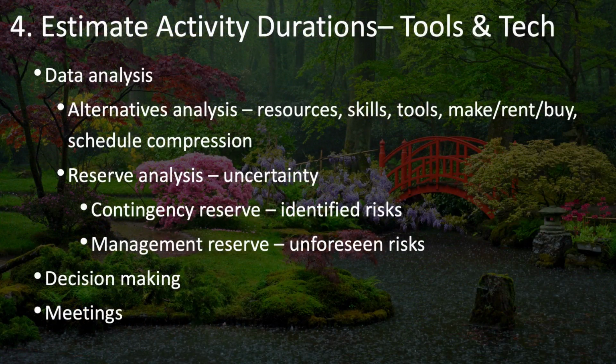There are also 2 data analysis tools that are part of the estimate activity durations process. These are alternatives analysis and reserve analysis. Alternatives analysis comes into play because as you're estimating activity durations, you'll need to consider the different resources that you have available to you and make decisions in comparing alternatives about whether you're going to use higher level resources or lower level resources with different skill levels, which types of tools are you going to use, and what are the different durations that these activities will take based on the tools that you use.